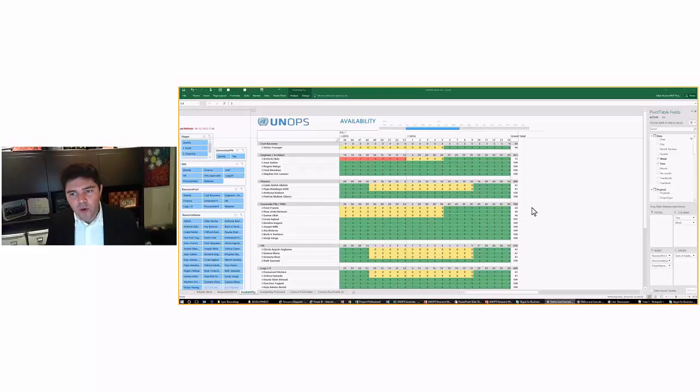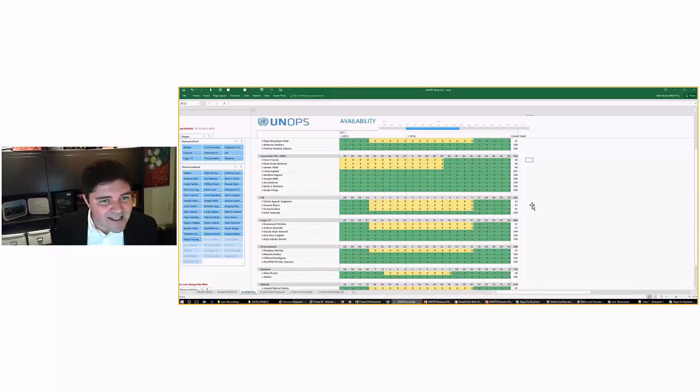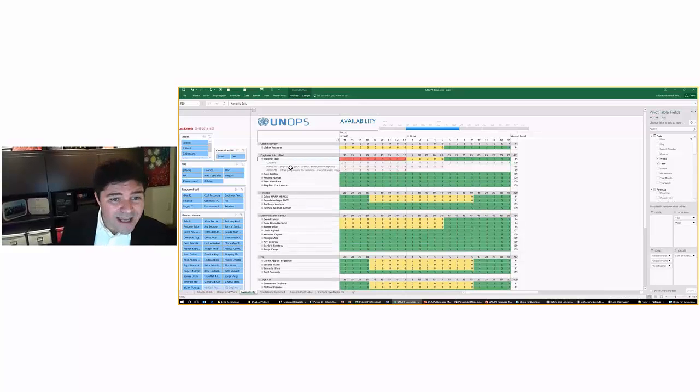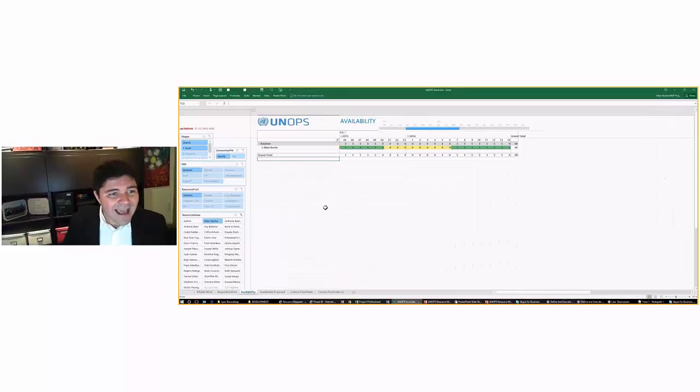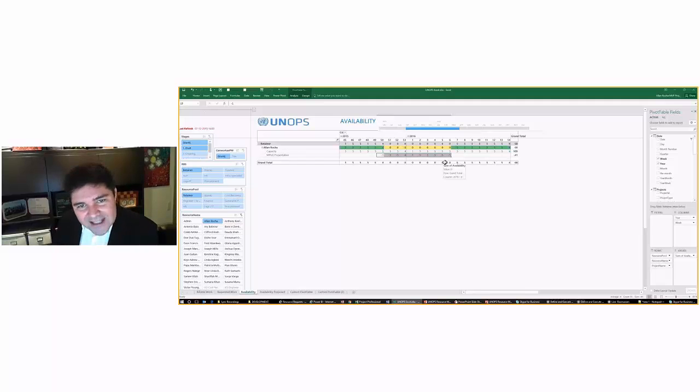And voila, you have now your Excel file showing exactly the availability for every month, and you can even see that this specific resource does not have any more available time during that period. And if you open, you can see all the capacity that he has and where projects are demanding him. So if you want to check, for example, on a specific resource, let's take Allan. If I check Allan and I expand here, look at this. Like magic, I can see now that on those weeks I have requested and the capacity for Allan, it's not available anymore.